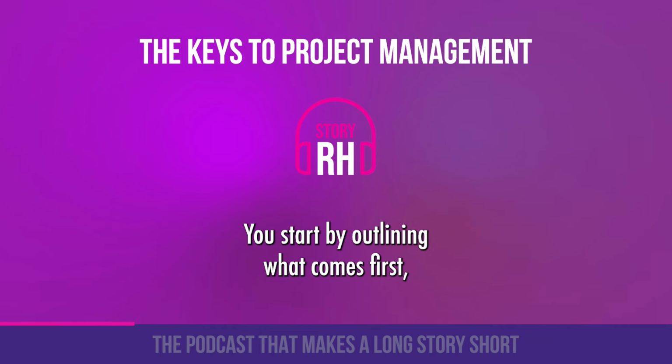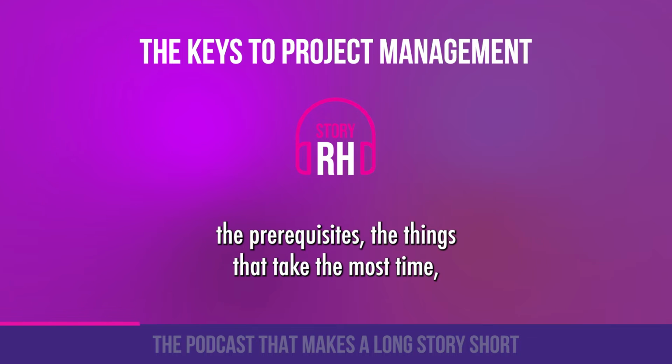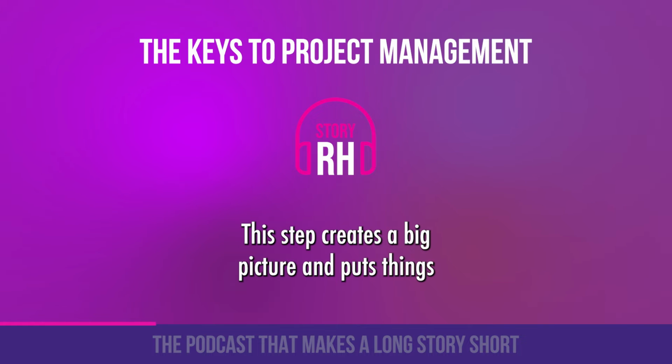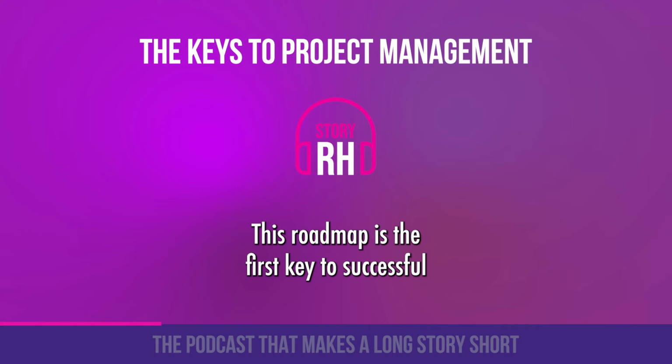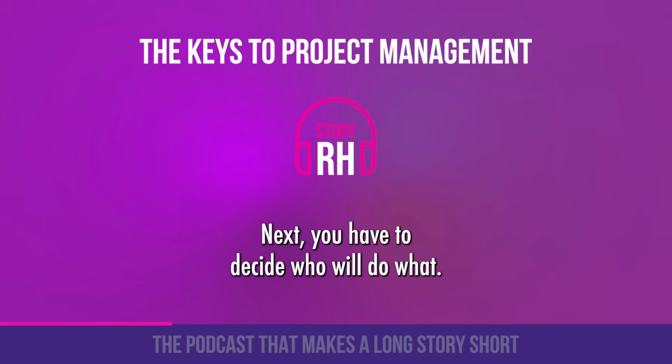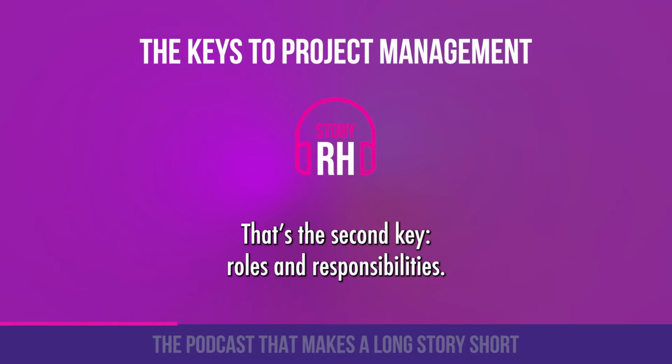You start by outlining what comes first. The prerequisites, the things that take the most time, which things will have to hold off a while, etc. This step creates a big picture and puts things in the right order. This roadmap is the first key to successful project management. Next, you have to decide who will do what. That's the second key. Roles and responsibilities.